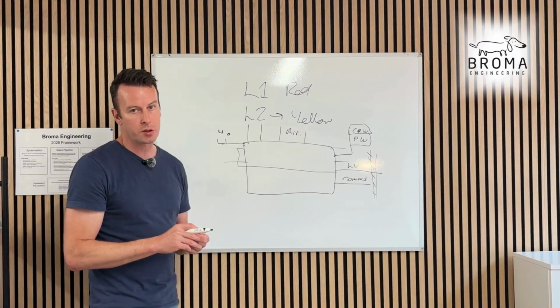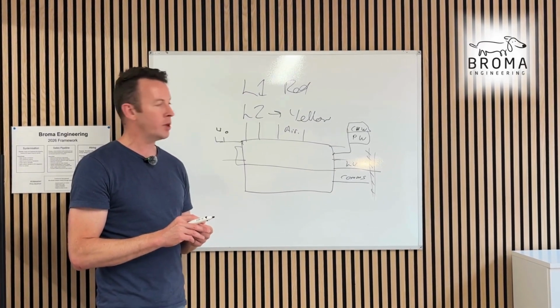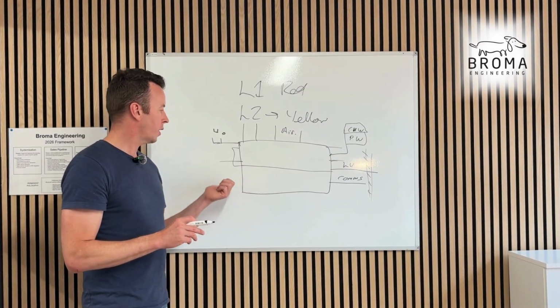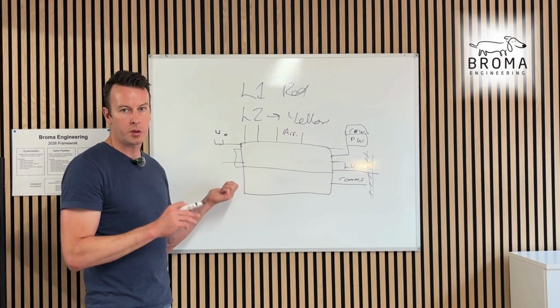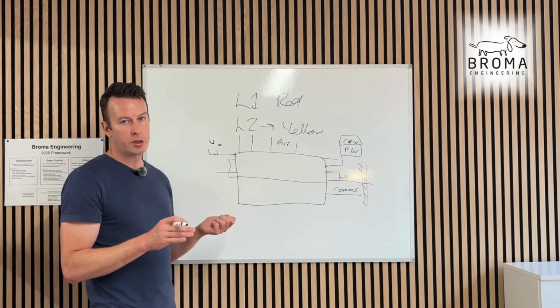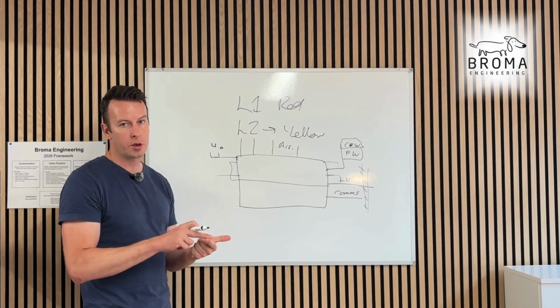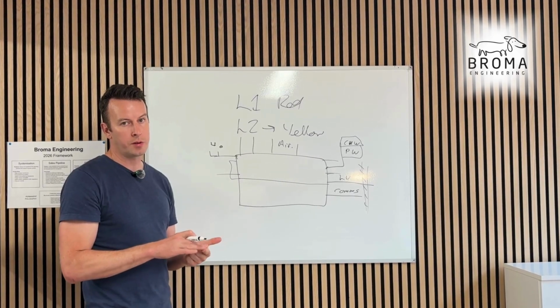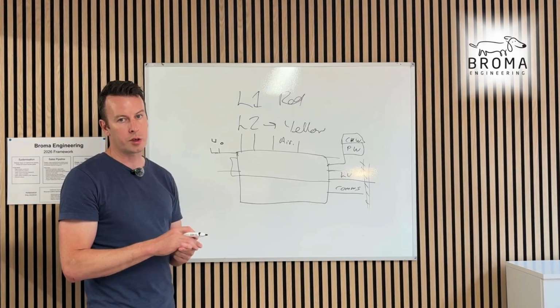There's no opinions in this inspection. We're inspecting what is in the model. We've built it as per the model. We've built it as per our technical submittals. It's in as per design. We've a detailed design, so any change now is a change order, and that's time and money. And you have to defend the case to keep this project on track.